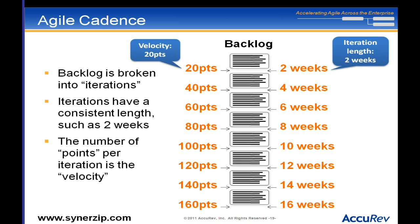Once we have our backlog, we break it up into iterations. An iteration is generally something like one, two, or four weeks — consistent in length. Over time I establish something called a velocity, which is how many story points I can get done in an iteration. For instance, if my iteration is two weeks, perhaps I can get 20 story points of work done.